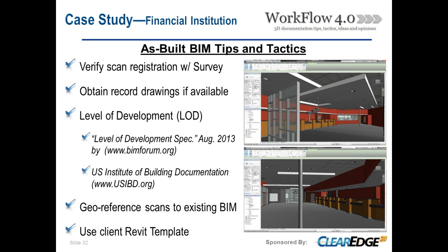And then last, relative to your BIM deliverable, your level of development in your model, this is really a big area. This is a challenge for us in the scanning industry, likely others. Really work with your clients to help develop that level of development for that final model. As Mike indicated earlier, the scanner picks everything up, so what you want translated in that deliverable is really essential. Same thing for owners. Try to communicate that to your scanning service providers so that you're going forward with a project understanding what that final BIM deliverable is going to be.